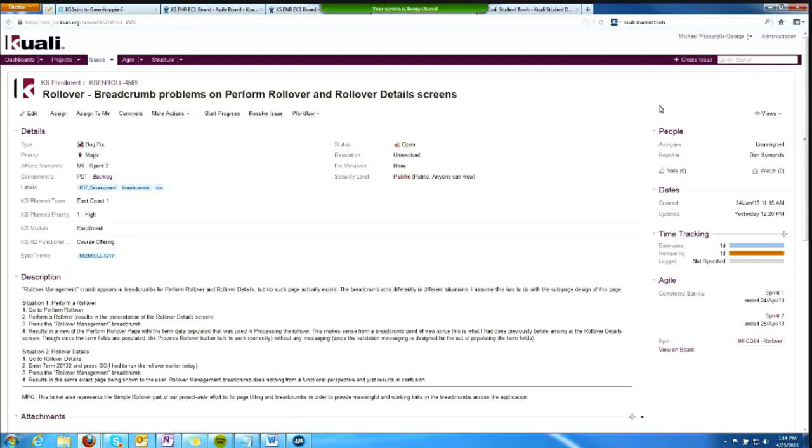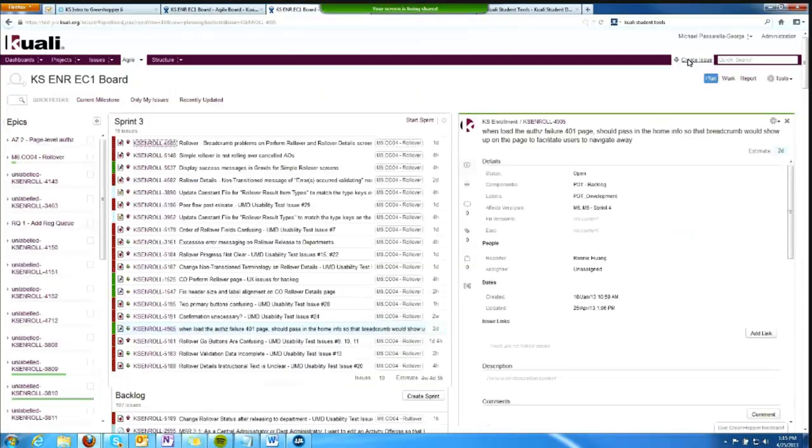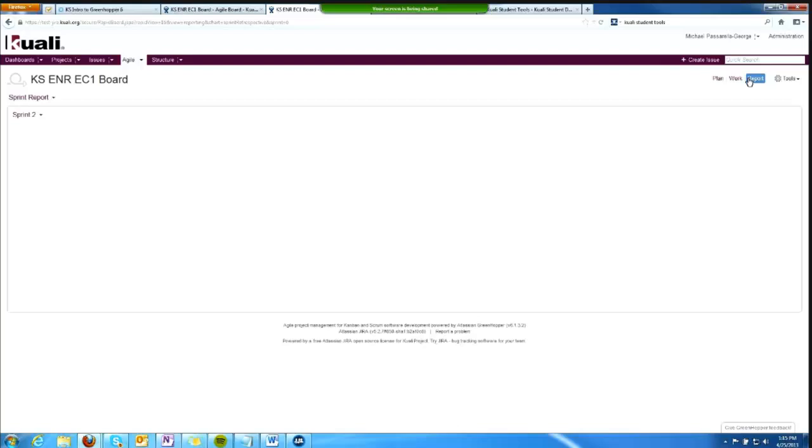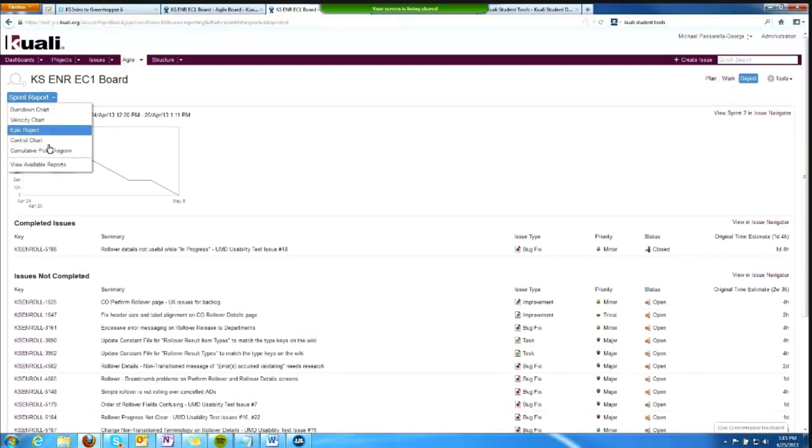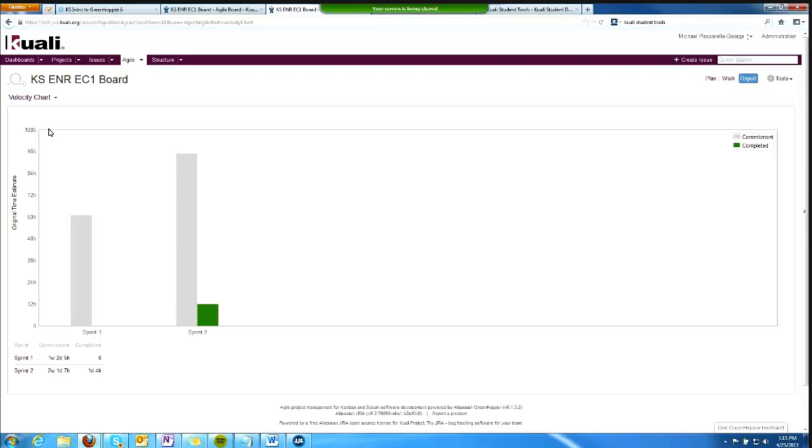Okay. So let's see, the next question in the chat: is there somewhere during the sprint planning phase where it shows us our estimated effort versus historical effort to help us determine how much work to bring into our sprint? I think we can see some of that through the velocity reports. So if I go back over to reports and I switch to velocity reports, there were 2 sprints in the test Jira, Sprint 1, Sprint 2, and we can see how much effort estimate we committed to and how much we completed. And we can see some graphs of that.